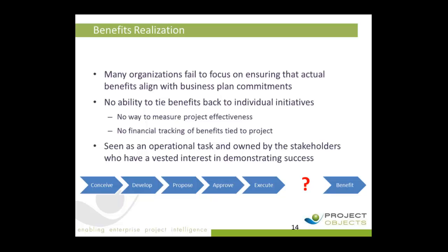And then benefits realization, the one that, as John mentioned, is always a little bit challenging. Many organizations fail to focus on this. They don't actually consider benefits realization at all in some cases after the project has been approved. It's part of the business case, but after that, the project delivers, you hand off to the operational leader, the head of the department, and then it never actually gets tracked. There's never any accountability. And for sure, in many organizations, there's no way to tie the project's results back to the department's or the organization's performance.